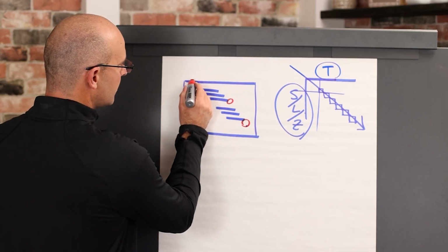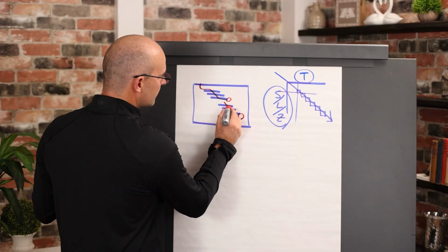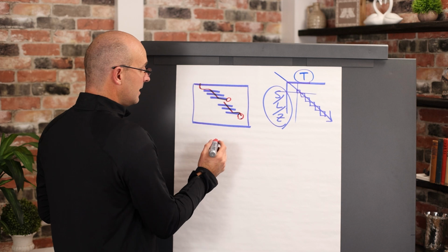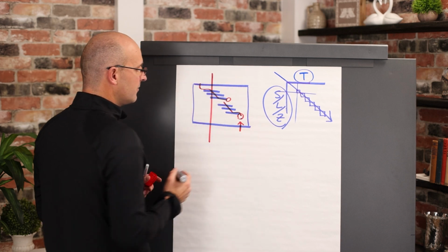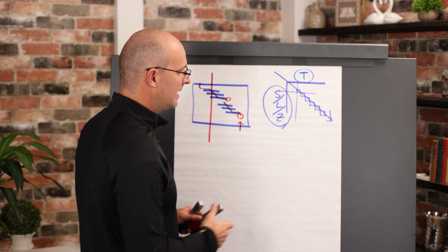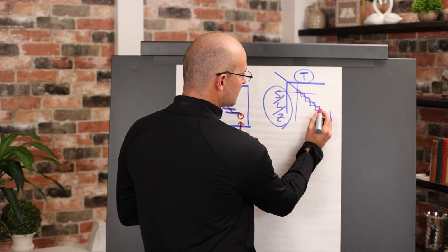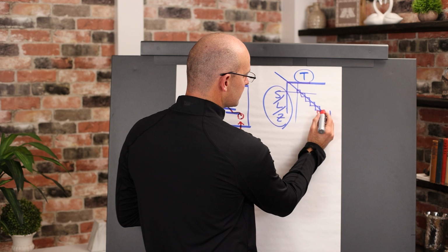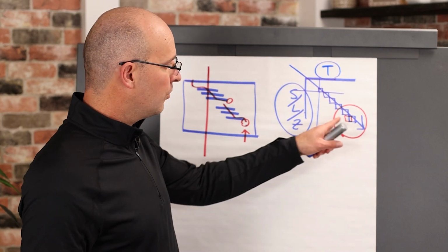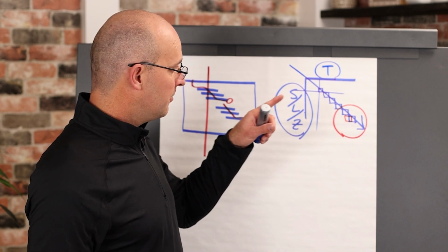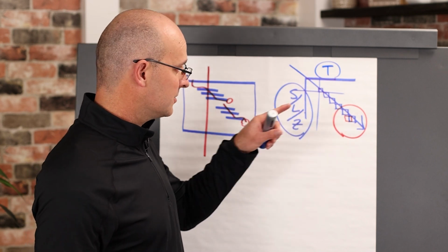And so the path goes through the phase, buffer, through the phase, buffer. And if anything happens in that schedule, we simply eat into a buffer and we still have the same end date, and we never stack trades on top of each other and start to slide them on top of each other, because that will bring out all of the woes or the bad things that happen in construction: